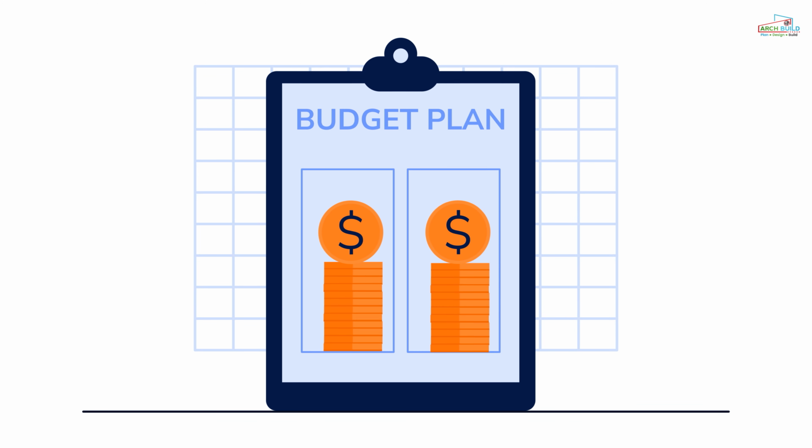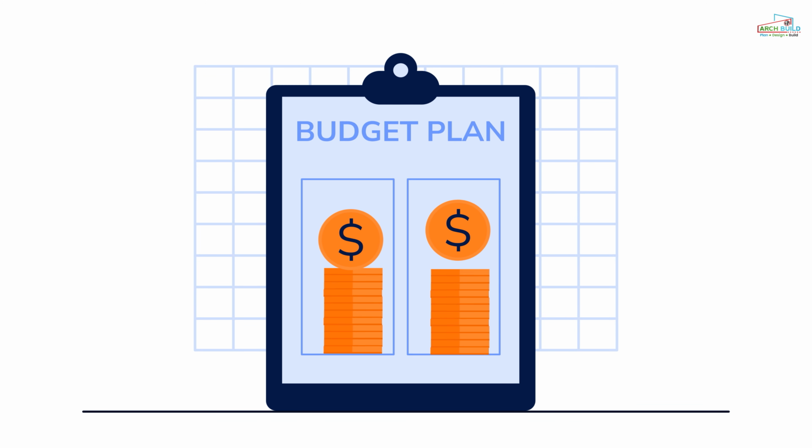One, you have to have the final budget of what you want to execute. Two, you must have a designated contractor who is going to help you in the execution of that project on that amount. Then you have to incorporate inflation in your bills of quantities. The cost of materials today cannot be the same next year, so you must incorporate that. We usually allow a 5% contingency for that inflation so that you cater for it.